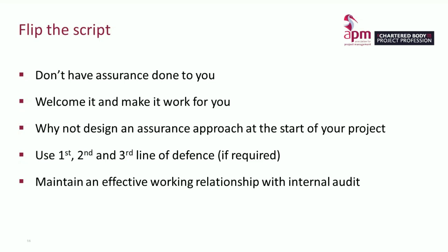This might be one that would involve only first line if it is a small change or a low risk project. You may decide that first line of defense and your assurance teams may be sufficient. Or if it is a large, high risk change, you may decide that you wish to involve second and third line. Obviously, internal audit may not be able to support your proposal, but they will always appreciate the proactive engagement and the control that you are trying to apply.